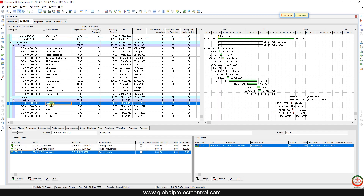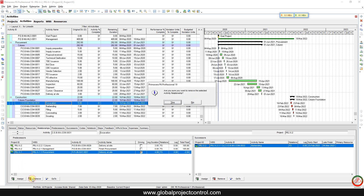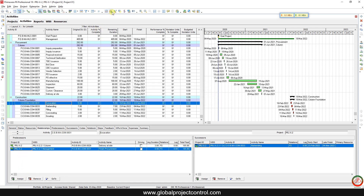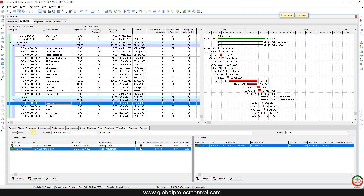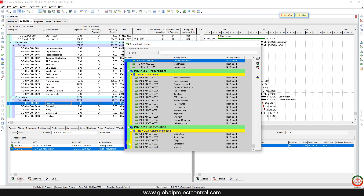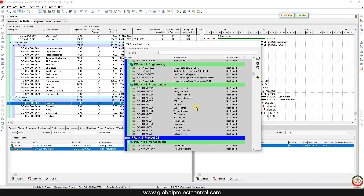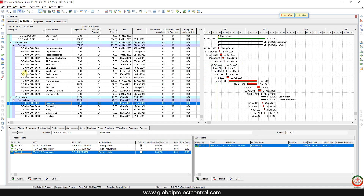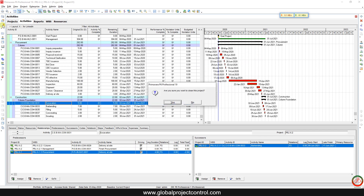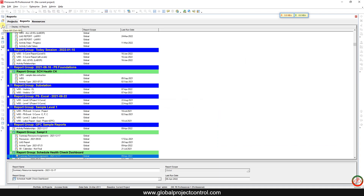Another important note: if I remove the relationship and schedule the project again, then add the relationship again for the delivery at site for Project First — but this time I do not schedule the project — I close the project and come back to the project list.